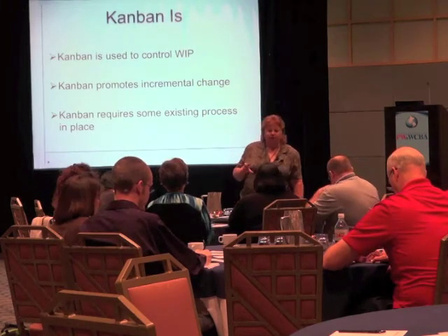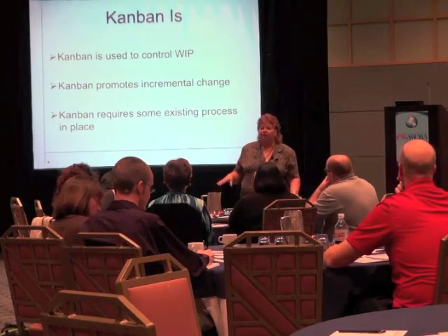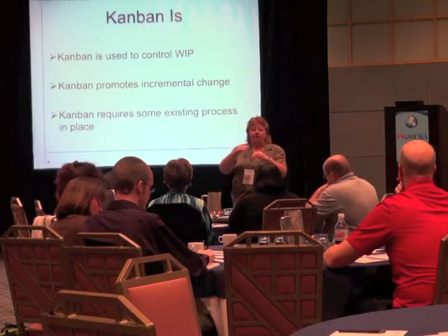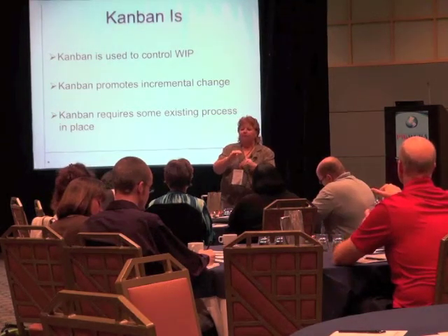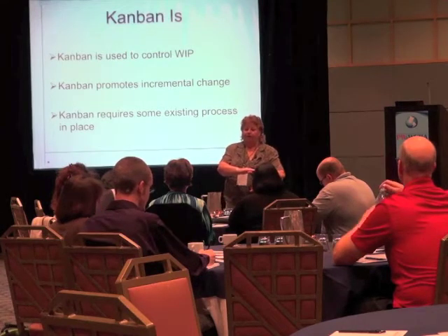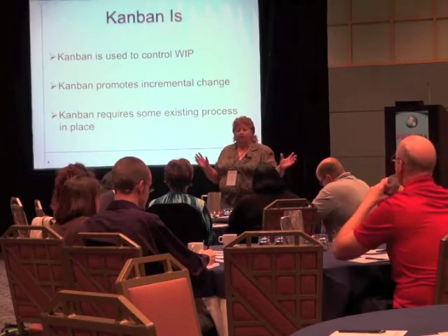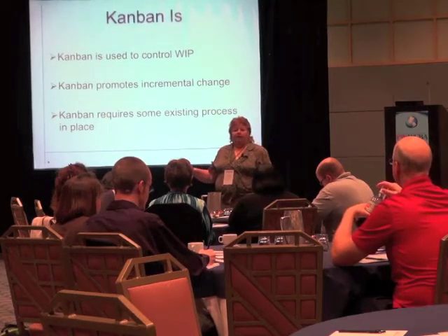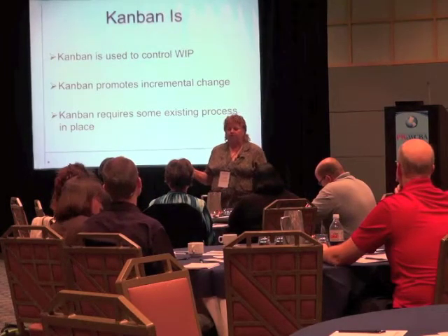If your work always varies, and that is your norm, maybe don't spend a whole lot of time trying to limit the variation or size it, like all small things go in one swim lane, medium things go in another, and then the really big stuff has its own bucket. If your work is always a mix, to get started, just put it in the mix and let cycle time show you how you could actually start to tune them.